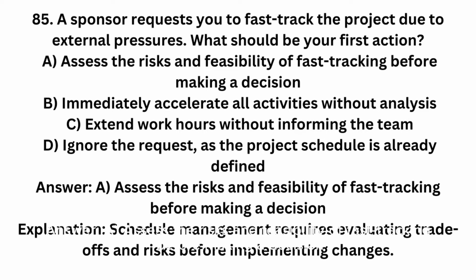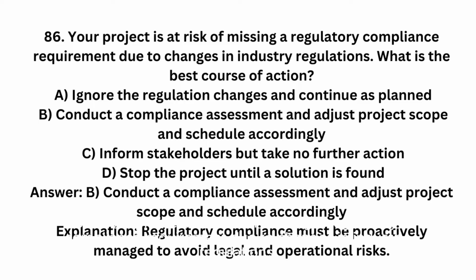Answer: A. Assess the risks and feasibility of fast-tracking before making a decision. Explanation: schedule management requires evaluating trade-offs and risks before implementing changes. 86. Your project is at risk of missing a regulatory compliance requirement due to changes in industry regulations.